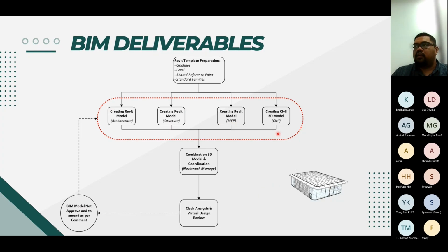Okay, so once the creation is complete, the BIM coordinator will combine the models by using Navisworks, then do the QC also. If they're okay, they will go back. So this one is the clash analysis, then virtual design review.